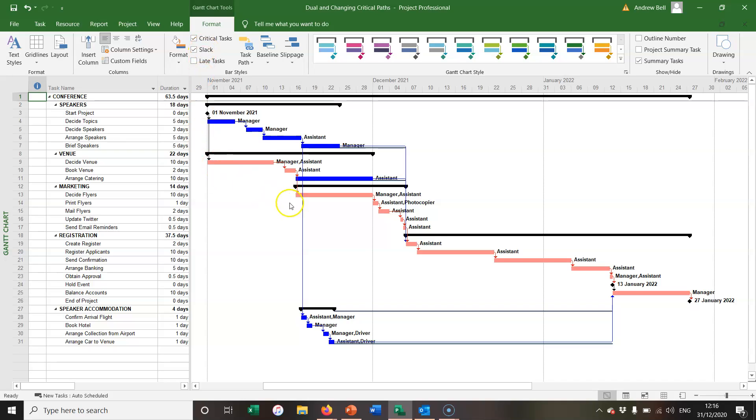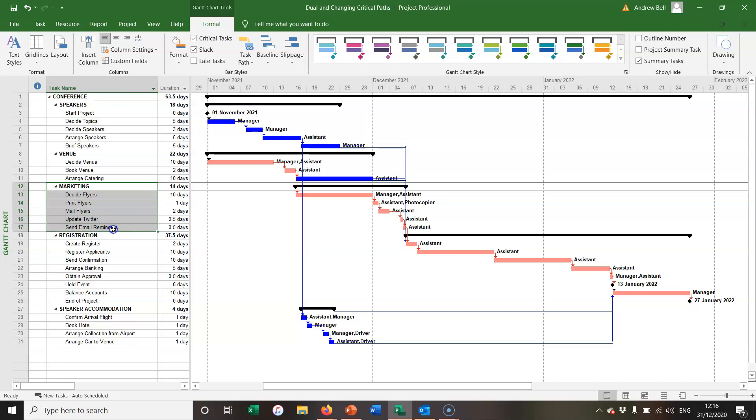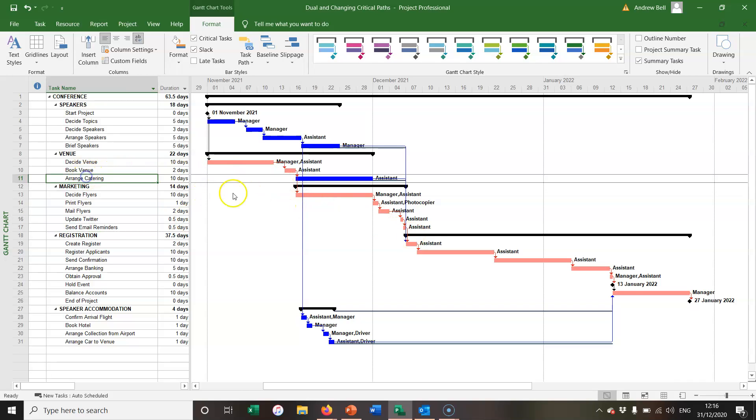We've got a clear critical path through the marketing section of this project, and this item here, arrange catering, is not critical.